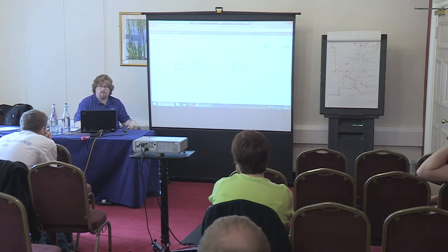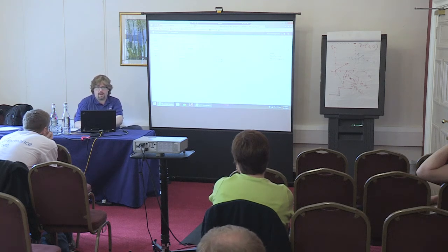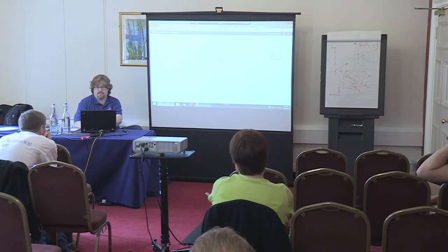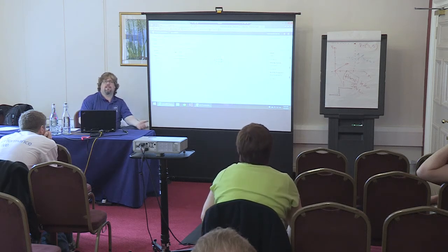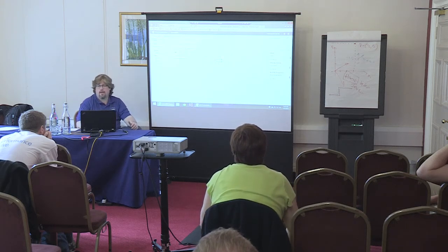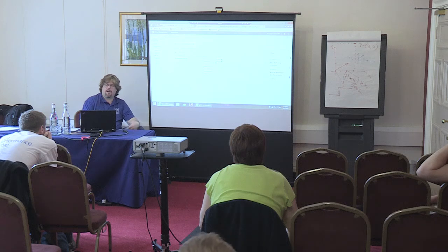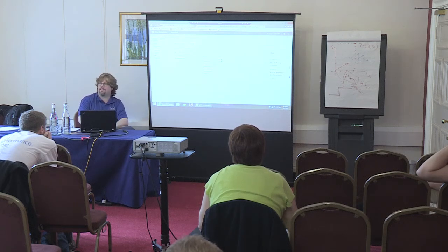Now, once I'm at my high-level work level, I can go to the sprint itself, and the first thing I can do is go in and define the capacity of my team. So right now, Brian's the only one on here, and I can say that I can do maybe 6 hours a day. I can choose an activity. If you're doing Scrum, you typically leave this blank because everybody's a team member developer in Scrum. If you do like to break things down, you can pick a primary activity. The downside is you can't split people across activities. So it's good and bad.